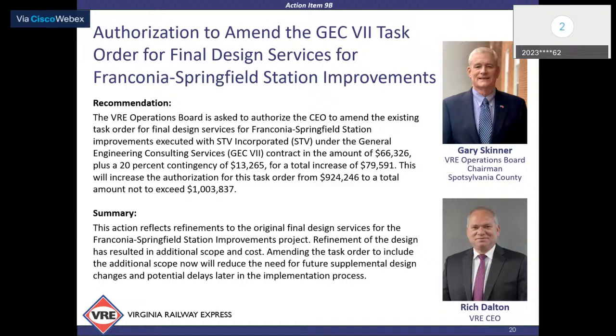Essentially, this amendment includes the need to develop 3 alternative designs and cost estimates to accommodate the east side pedestrian access, which will lead to modifying the existing design and cost estimate.